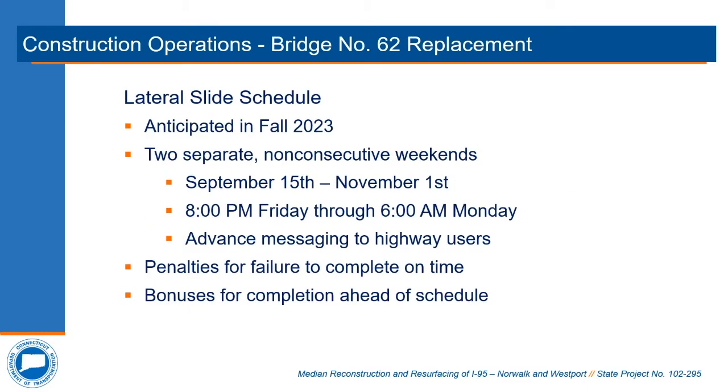The lateral slide operations are anticipated to occur in fall 2023 over 2 separate non-consecutive weekends. The construction documents provide for a 6-week window between September 15th and November 1st for this to occur. These dates are consistent with prior coordination with Town of Westport officials as well as with our environmental permit restrictions. The extended weekend periods begin at 8 p.m. Friday and run to 6 a.m. the following Monday. In advance of these periods and throughout them as well, there will be a substantial messaging campaign to alert users of the major construction activity.